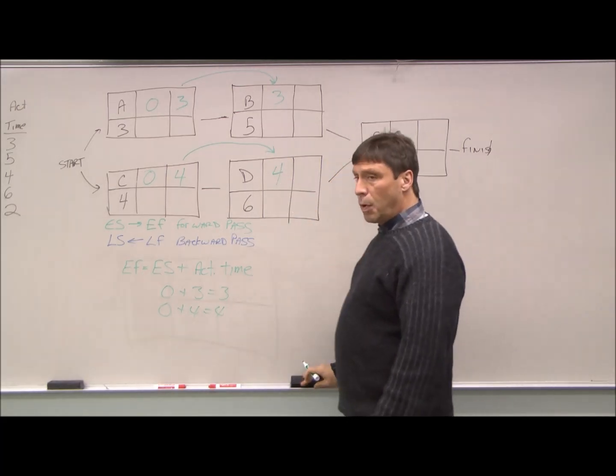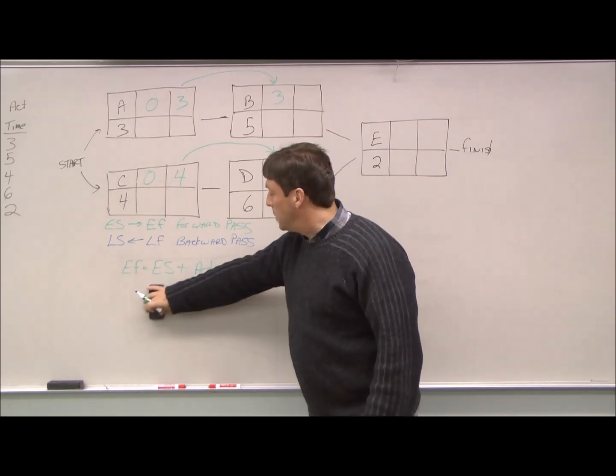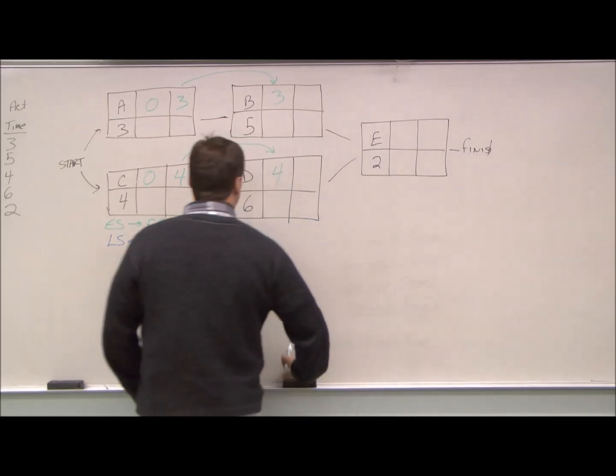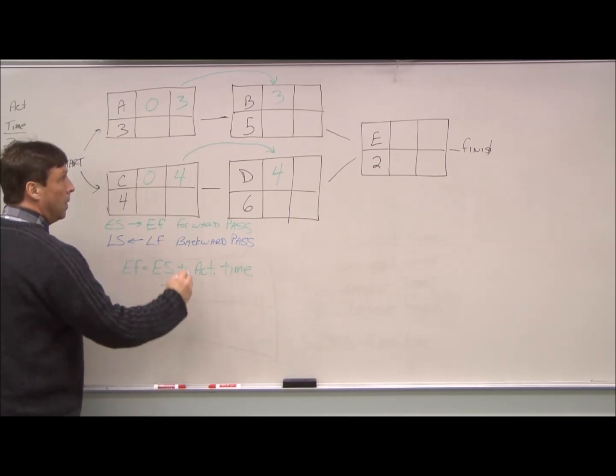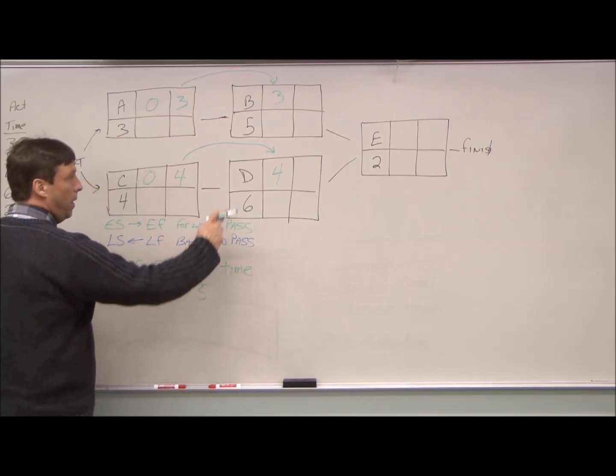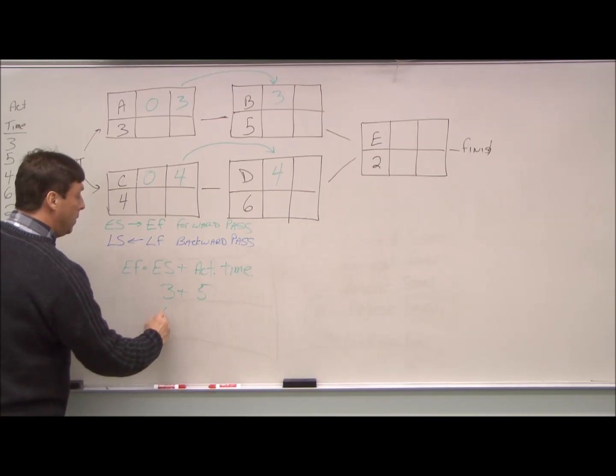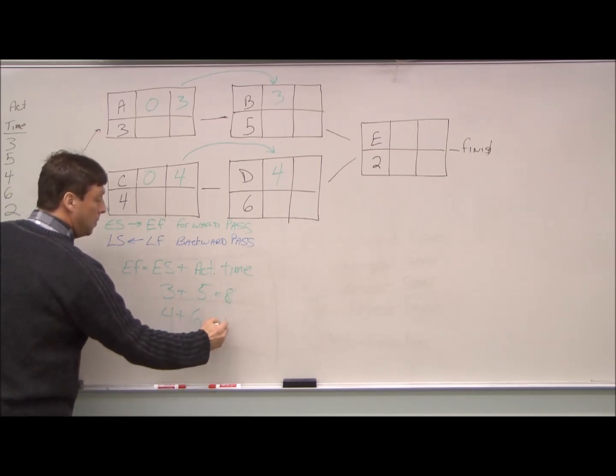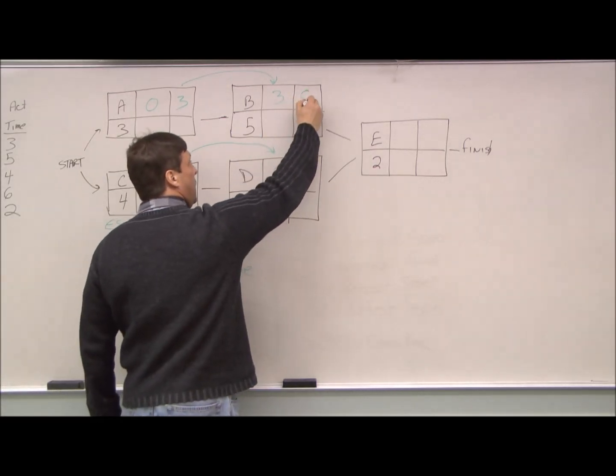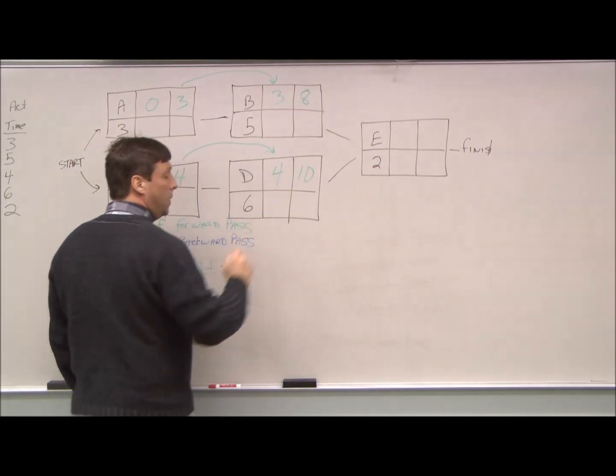Then we go through and we do the same calculation again. For B, our earliest start is three. Our activity time is five. For D, we have four and six. So, eight and ten, respectively.